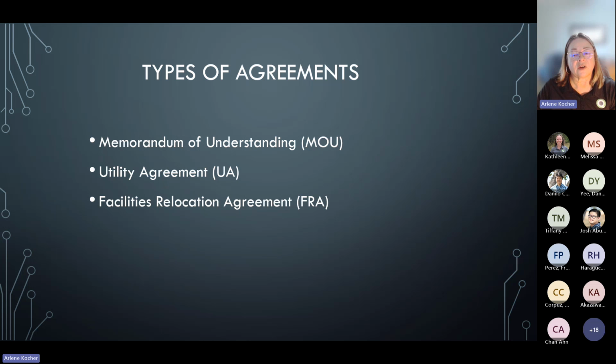These definitions are from section 6.7, utility design, of the project development manual, and the costs have been updated to the higher amount of $250,000. The manual still says 50,000, but there was a memo to update that to $250,000.